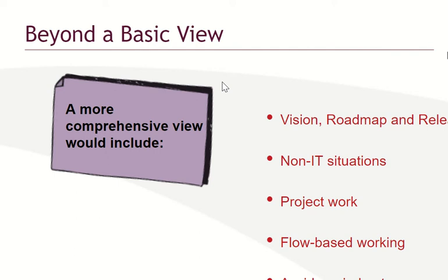Minimum viable product means that product is the first one and it has basic features. For example, you have a land and you do fencing and you do the gates. That you can deliver as a product. It is the minimum you can do on a property. Do you agree?